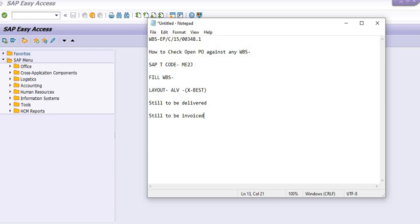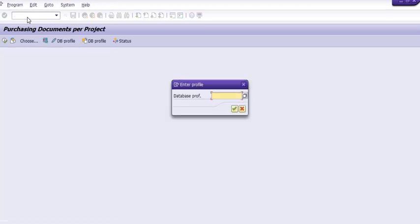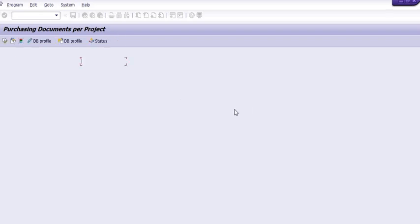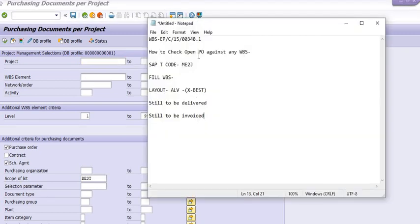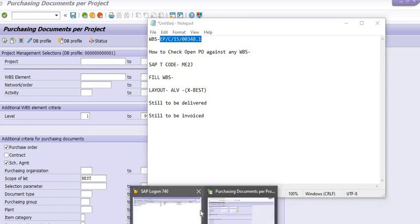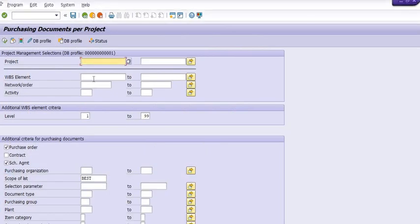We are going to execute transaction code ME2J. Select the database profile from the dropdown. We are going to copy our WBS number and enter it here. You can also copy the project number if you have multiple network numbers.